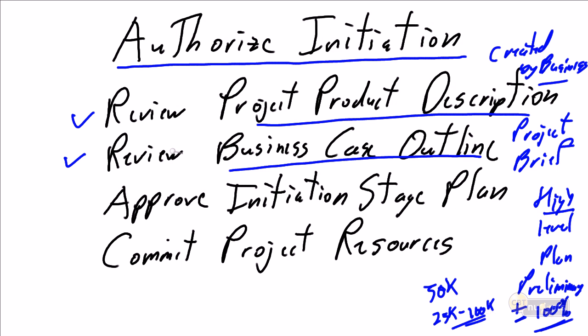And it's important that senior management, when they're directing a project, when they're specifically authorizing initiation, understand that these are high-level preliminary outlines, project briefs. Again, pick the words that you want, but we don't have a lot of precision at this point in time, but we're seeking approval to proceed to get more precision. We're seeking approval to say, yes, this is a good plan. We have validated the eureka moment. Yes, it makes sense to proceed.